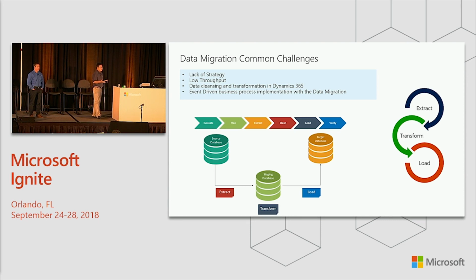So on data migration, the point that we pointed out is that you need to have a strategy in place, right? And then what's the process of extracting the data, cleaning up the data, transforming the data, and later on, loading the data into the system. It needs to be repeatable and predictable for your data migration, so it's not going to impact your go live at all. Do you have anything to add here?